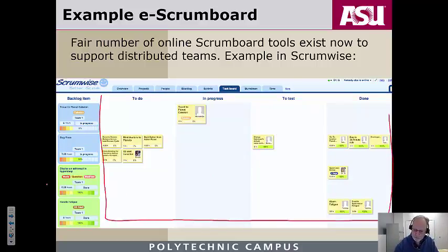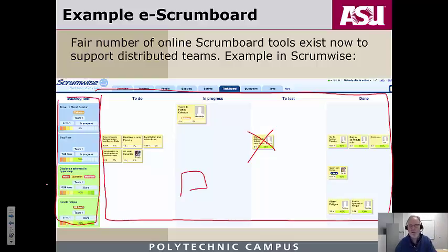Team can decide that a task is not worthwhile and delete it, and decide to do something else and add a new task at any time. But the team can't change this, the agreement of what work was supposed to be done. The team can't change the timeline for the sprint dynamically. They can't say, well, we're not going to get all those done in the 2-week sprint, so we're going to move the sprint back a week. These are fixed time box iterations. They don't get to do that either. They get to only own this part, if you will.